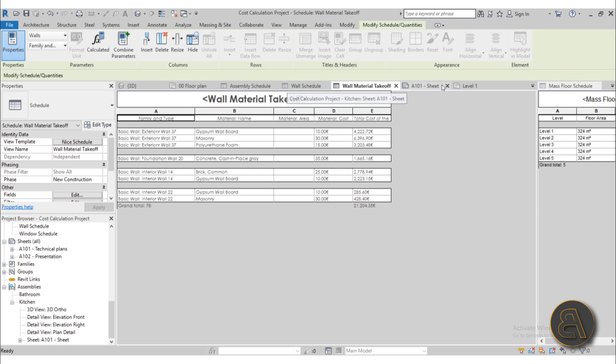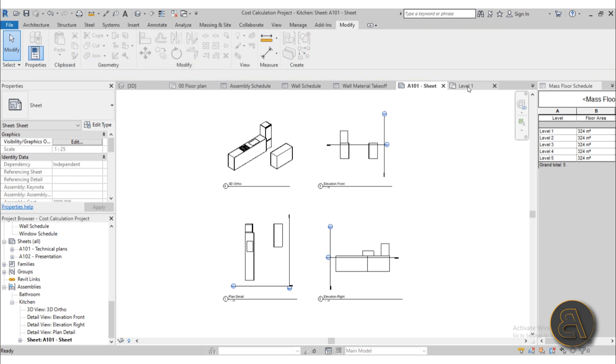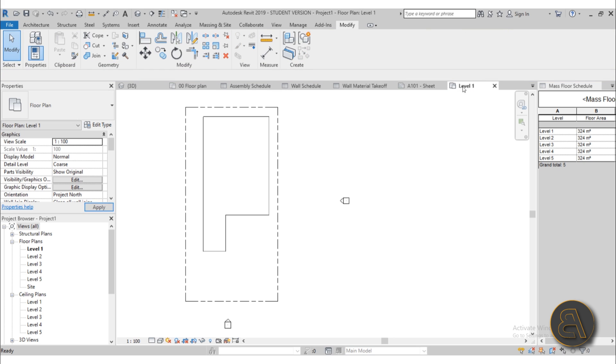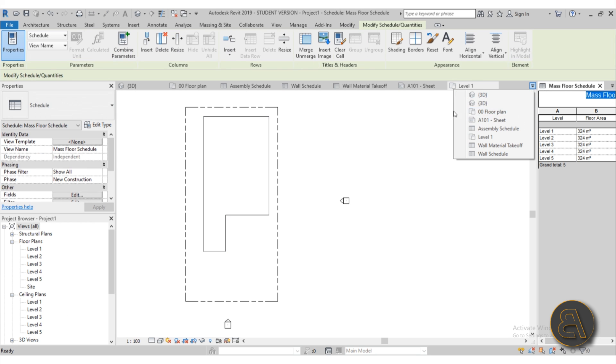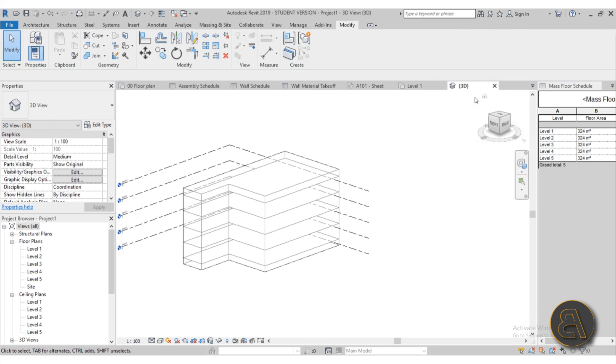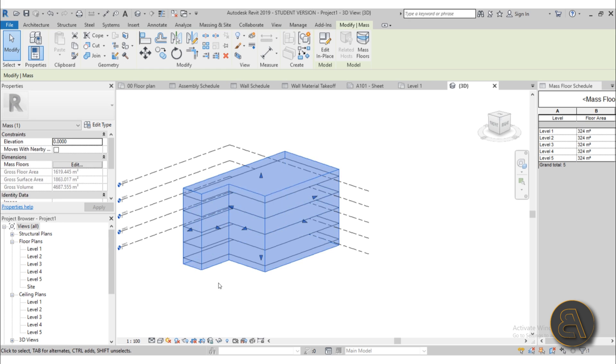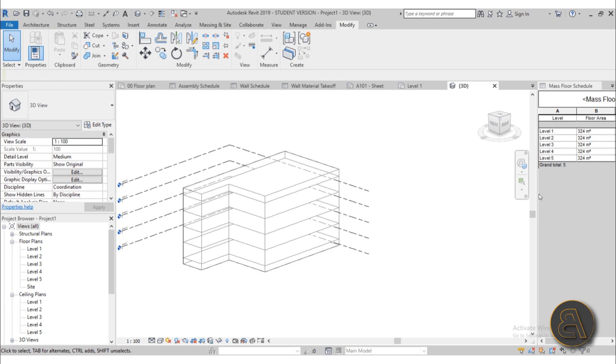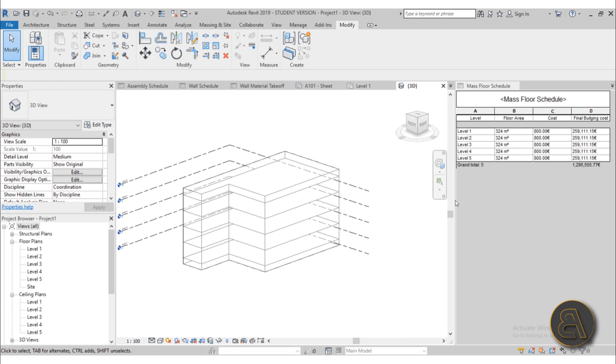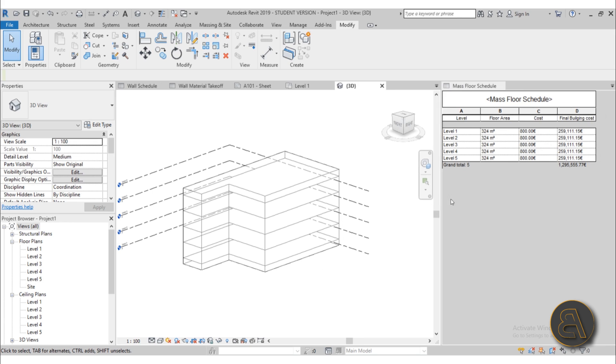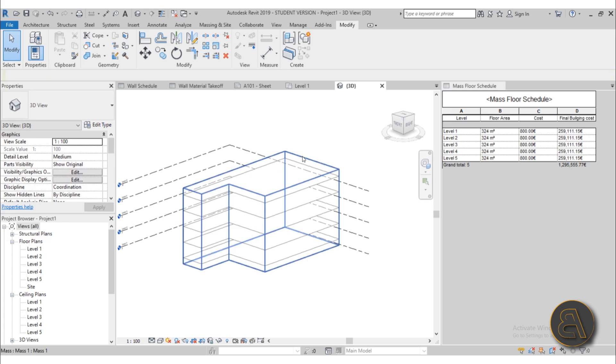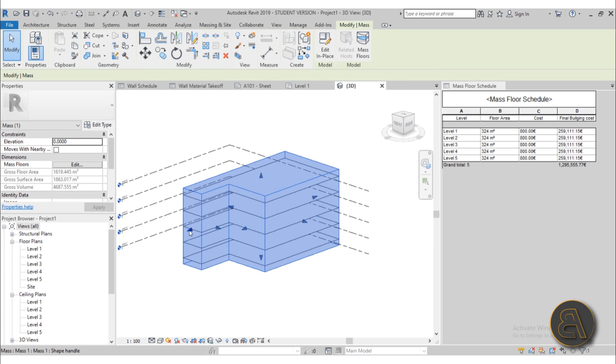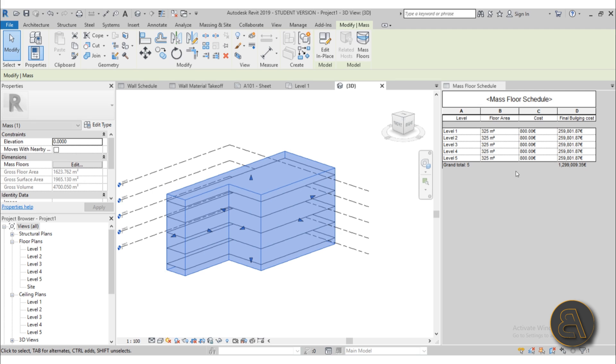Also I'm going to be covering this building over here, so let me show you that - that's this 3D over here, so that's this building. It's just an in-place mass but here we have a schedule that we've created and it's customized to basically you can add the cost per square meter and then here we have the floor areas. Basically you can select this mass and you can play around with the building design and here within the schedule you're going to get the final price of the building.